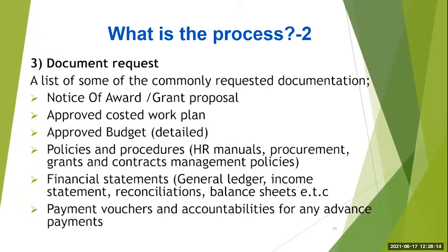So this work plan shows clearly the activities that you planned to do in that year. It shows, first of all, the objectives, it shows the activities, it shows who is responsible for this activity, and what the expected outputs are.